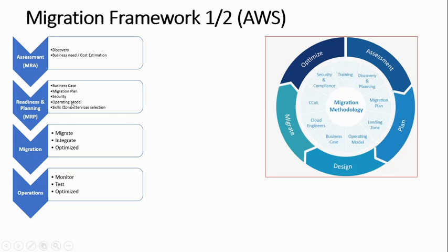Operating model, which is very important. Operating model in the sense, who will own what responsibility. For example, application or infra, and who will own the design, who will own the implementation part, who will own the operation part, who will own the end-to-end delivery part, who will report to you. So that operating model or the RACI matrix has to be defined. Skill zone and the service selection. So what all services you are going to choose based upon your budget, which skilled people you are going to hire, who would be your admin, who would be your operation lead, those things that you need to manage.